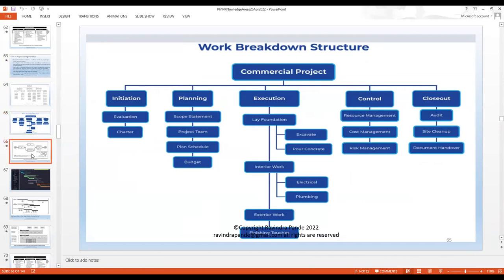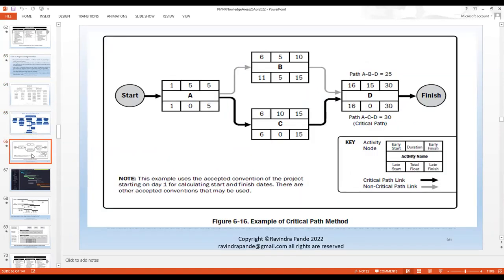Let's revise the critical task. We normally fill this project plan to understand the critical task. Critical tasks have the least amount of lags — they are mostly continuous tasks we execute from start to finish, or a sequence of tasks. If even one single task gets delayed, the project gets delayed. I need to keep a very keen eye on all these series of tasks. There can be a second critical path as well — if the first completes fine, I might have a second critical task to work on.